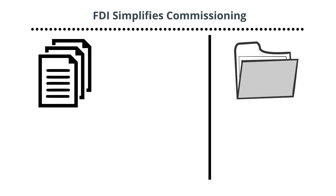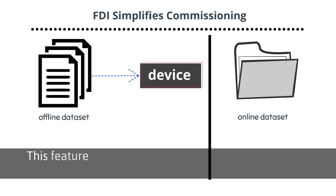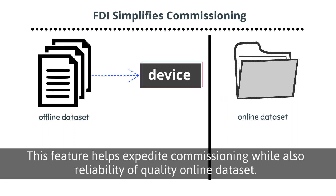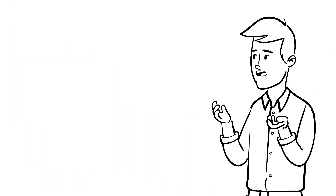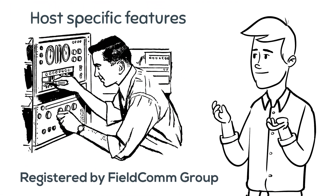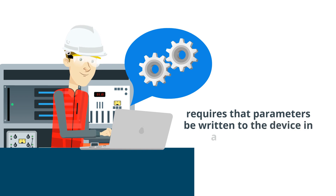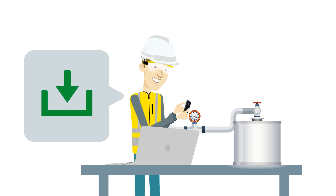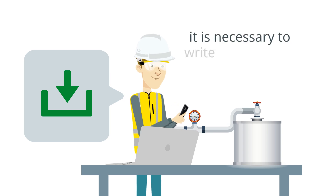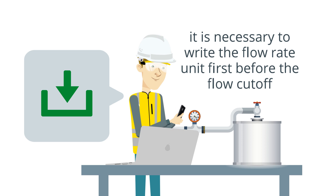During the commissioning phase, FDI uses two separate datasets: an offline dataset and an online dataset. Additionally, standardized practices for transferring the offline dataset to the device are defined. This feature helps expedite commissioning while also improving the reliability of the online dataset. These practices are host-specific features, so make sure that your host is registered by Fieldcom Group. For example, committing a configuration to a device sometimes requires that parameters be written to the device in a specific order. Using a flow meter as an example, while downloading flow cutoff and flow rate units from the offline dataset to the device dataset, it is necessary to write the flow rate unit first before the flow cutoff. If written in reverse order, the unit may not be accepted by the device if the cutoff value is out of range.